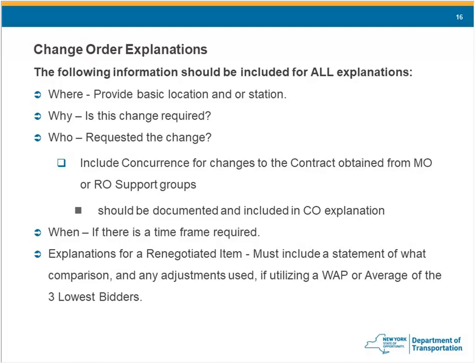For bigger dollar stuff, it's not good enough to just say the engineer's estimate was off. If you're getting into bigger dollar values, getting over near thresholds, you need something more detailed. You need to do your homework, get into the engineer's estimate, figure out what they were trying to do with the quantity, and determine why your quantity is different than what the engineer has proposed.